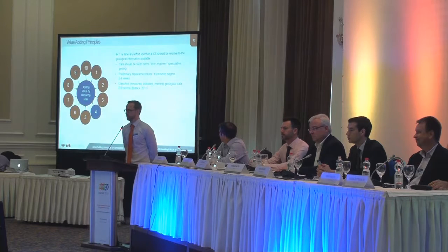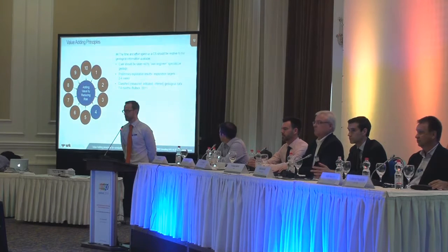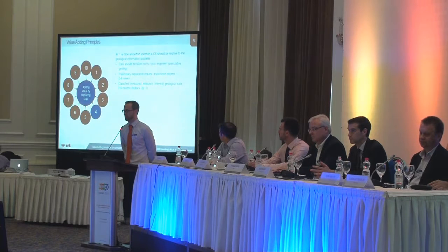Time and effort spent on a conceptual study should be relative to the geological information available. Care should be taken not to over-engineer speculative geology. A conceptual study can take between 2 weeks and 9 months to complete, depending on what information is available.